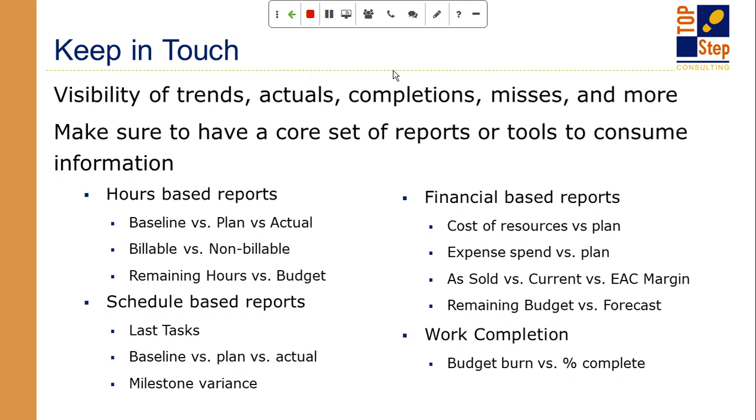So you can see I focus a lot on the cost in the 3 or 4 reports that I mentioned here on the slide. But there's also a financial component to the forecast. So am I forecasting to spend more money with the customer than I expected? So is the customer going to have to pay more? Is there a cap that I have to manage to? So therefore I'm going to have to see about getting change orders.